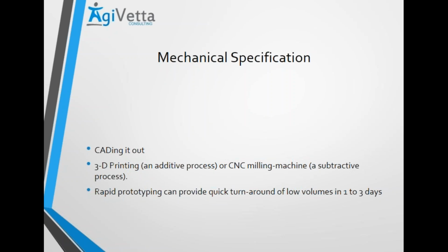So that might be something you want to look at, and see whether we can use some kind of Kanban specification and also techniques from, for example, DSDM to look into this feasibility study. Creating idea boards where you have the pros and cons of each different kind of design you have prepared, and maybe using certain innovation games, where for every design you have created, the various stakeholders involved brainstorm what is more important in this particular device design, and what are things we can look at later.